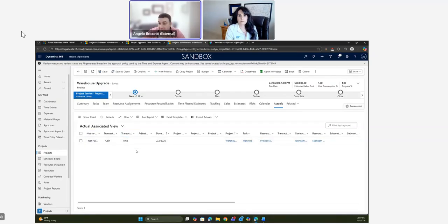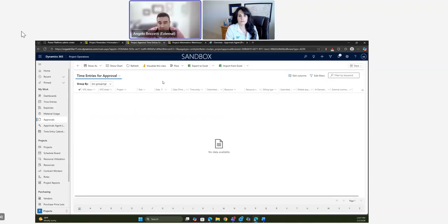If I did have a time and material contract set up on this project, I'd get both the cost and then the unbilled sales actuals, which can be billed to a customer. If I don't have that set up, we're just seeing cost. But again, the approval is the trigger for those actuals being created. And it's a very important setup. There's a lot of problems with making mistakes in submissions and approvals, and making a correction after the fact is going to take a lot more time than just getting it right the first time.